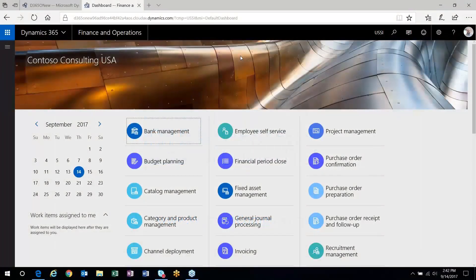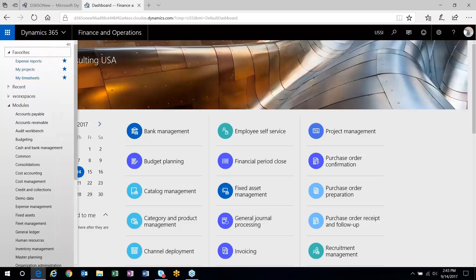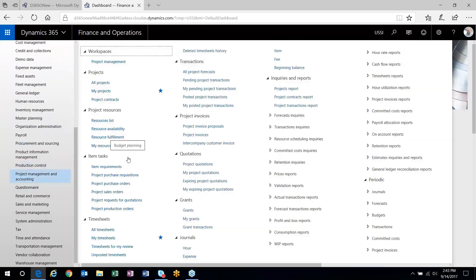We're going to go through how to use billing rules in the Project Management and Accounting Module in Dynamics 365 Finance and Operations. Everything is going to be run through that module. Normally through projects you have the ability to invoice customers through time and material projects or fixed price projects. With time and material you accumulate costs and pick transactions to invoice, and for fixed price projects you set up on-account transactions to invoice your customers.